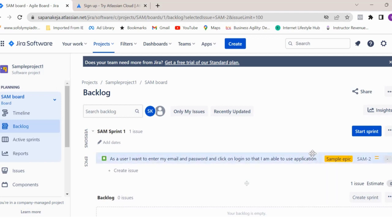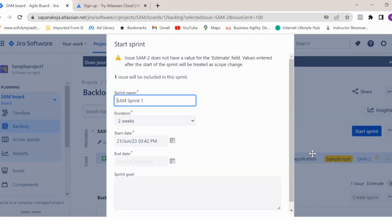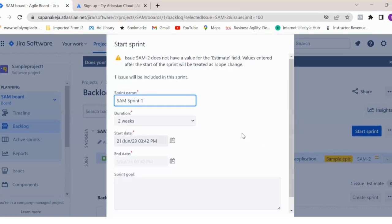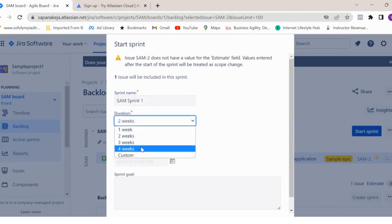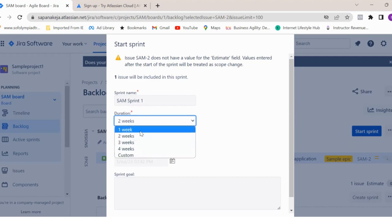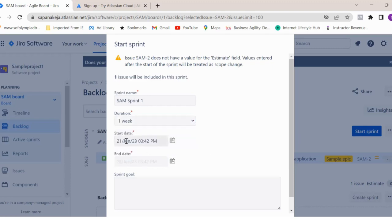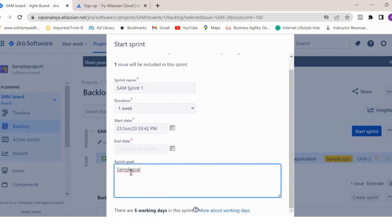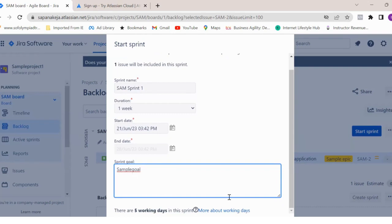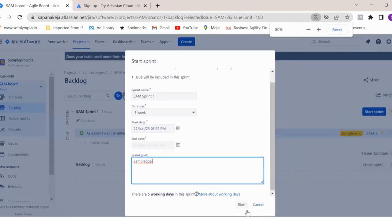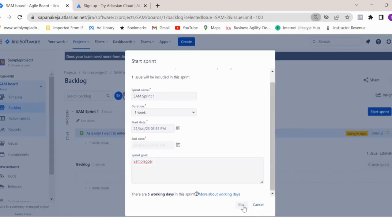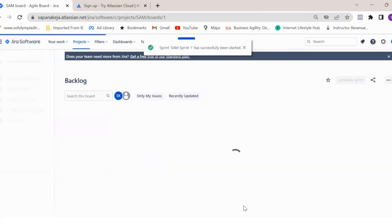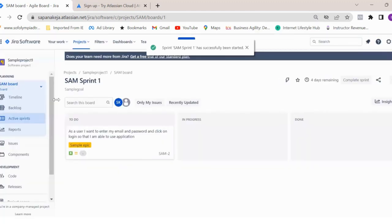Once you have that, you can click on start sprint. Here you can select duration of the sprint. It could be one week, two weeks, three weeks or four weeks. Even a custom option is there if you want to add some custom dates. For now, let's select one week sprint. Today is 21st June and the end date is selected as 28th - that is by default because we have selected one week. Then you can give the sprint goal, which is very important to define a goal for a sprint. I'll just write sample goal and then click on start sprint. Your sprint got started.